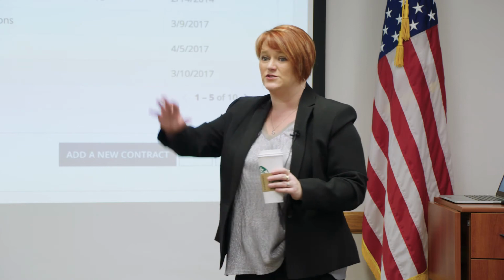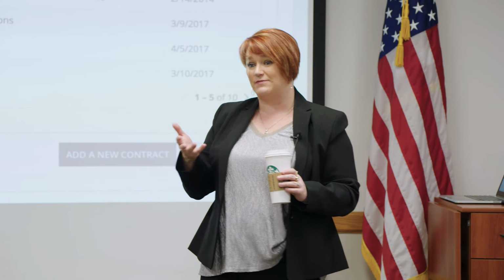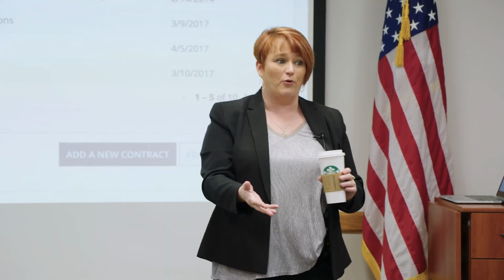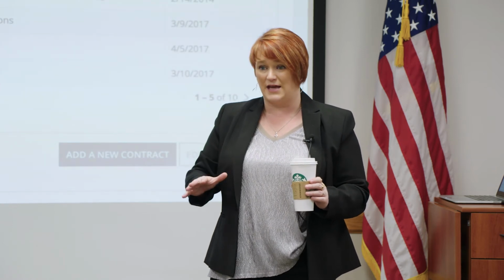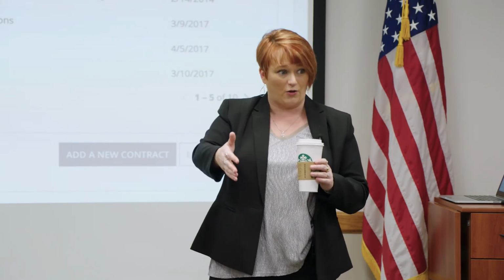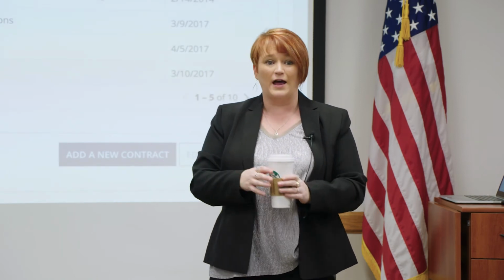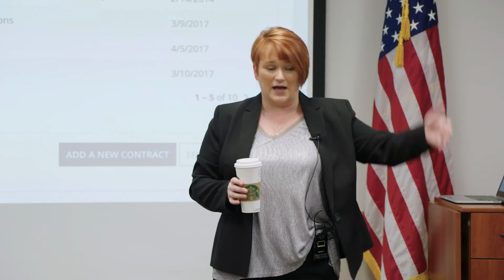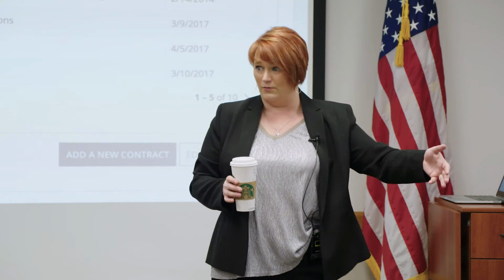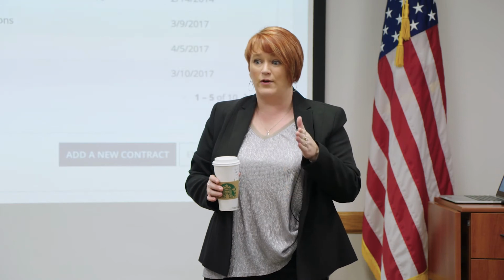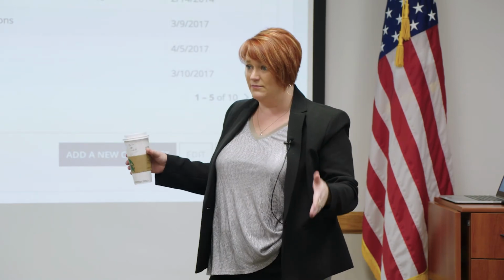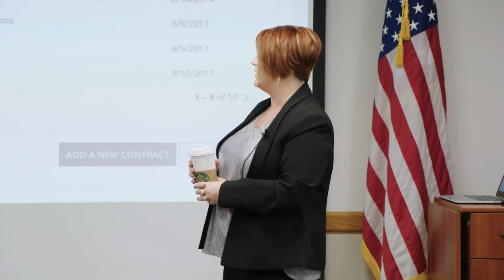For most of our connectivity services, you have an actual contract, but in a lot of cases you have something dated and signed, but it has to go before the board at the school board meeting next month for it to be official. You can sign and date something today that shows that you have told them we're going to go with your bid. That is okay. You do not have to wait 2 months for that signed official copy that goes through your school board. So USAC just wants to see that you waited 28 days and that you signed the contract before you put it on this system, that you have some kind of agreement before you put it on.